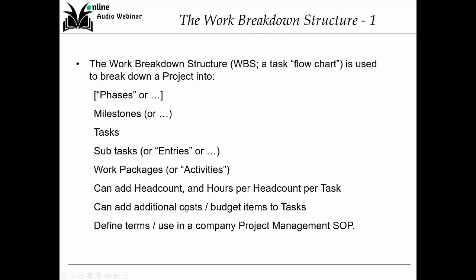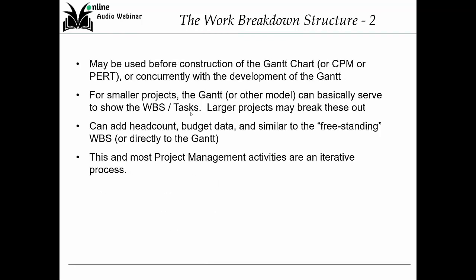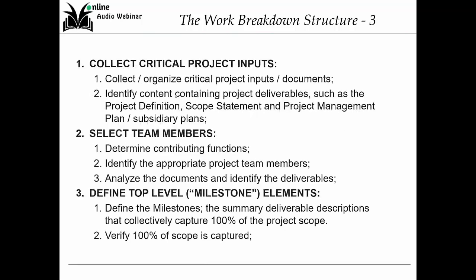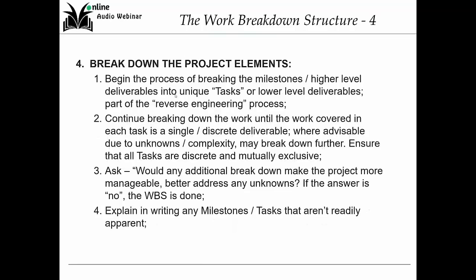When you're working on a project, you're going to break down the project into steps. My goal is to be able to quickly implement it, quickly explain it, and be intuitive in reading it. So the work breakdown is usually the starting point. You're listing all your milestones and tasks from start to finish by reverse engineering from the end point. So now you want to start considering what are the critical structure elements? What are the key activities that need to be taking place? Breaking down the project elements.